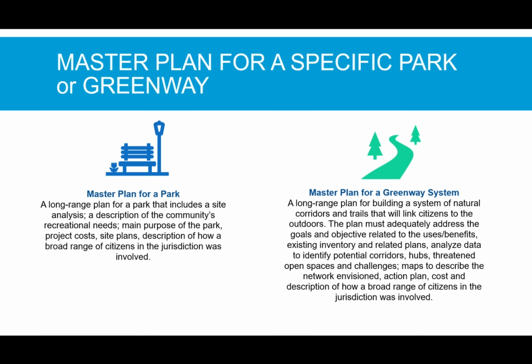So master plan, that's usually for a specific park, so it's very detailed on one site. It's a long-range plan for a park that includes a site analysis, a description of the community's recreational needs, the main purpose of the park, project costs, site plans, and a description of how a broad range of citizens in the jurisdiction was involved in the development of that plan. It is not simply a site plan. It is a full document that has all of these elements.